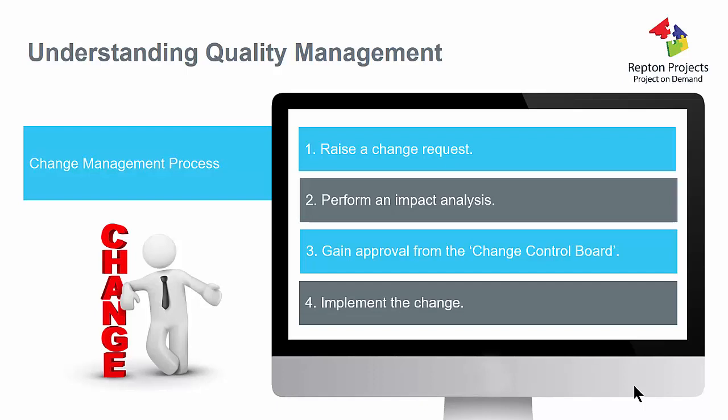So the first thing that we do in this change management process is we request whoever is requesting the change to write a change request. That doesn't mean to say that we can't help them prepare this, but I would strongly recommend again that we either sit down together and do it, or they do it, because it makes them think about why they want this change. What we really need to put into this change request is a description of what the change is, and almost a justification why we want this change. So that we're not just saying, I don't like it, I want something different. It's, I don't like it because of X, Y, Z reason. So if we haven't got a good reason to change it, then we probably shouldn't be changing it at all.